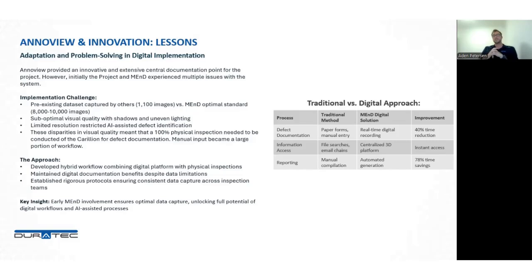So I suppose the critical insight there is early technical team involvement from project inception ensures optimal data capture and then unlocks the full potential of digital workflows. If that technical team or digital team comes in the last couple of weeks of a project, everything's already been set and it's very hard to move within those parameters. However, if the digital team's there from the get-go, they can optimize those digital workflows.